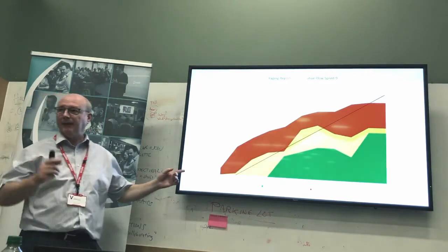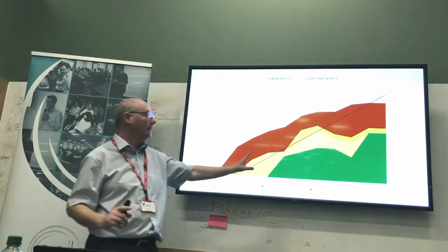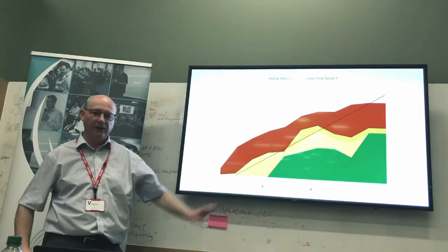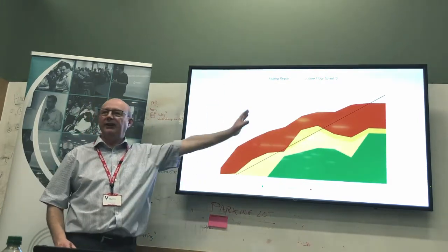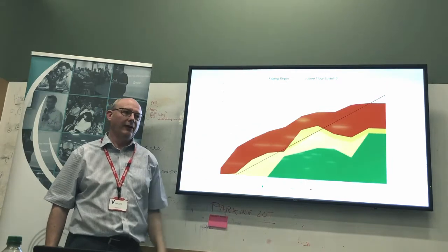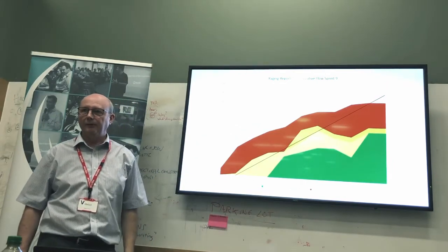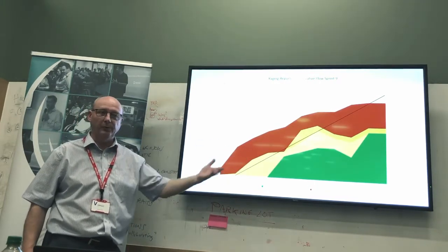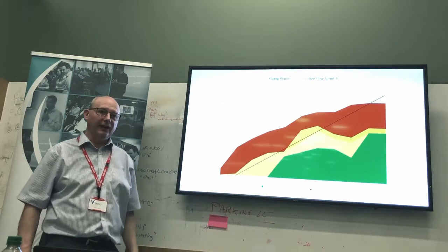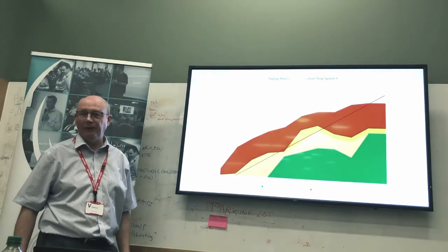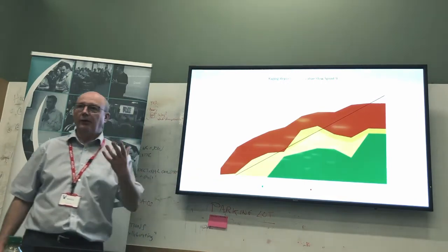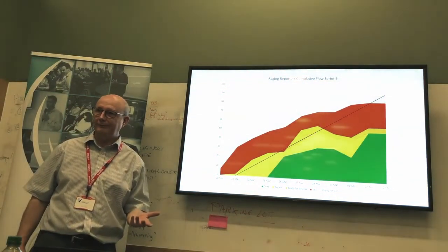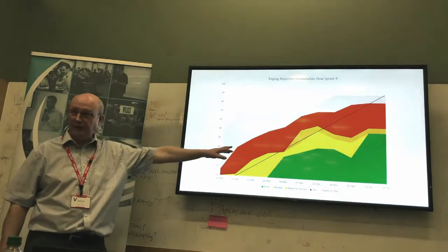So I think there's two different kinds. Exactly. What's happening here is pretty much that. The team are saying, "Oh, okay, I've delivered it to pre-prod, it's done." But what's not happened is anybody from the other side of the fence spending any time on testing or looking at what's been put onto pre-prod, onto the beta system, to say, yes, we've said it's done. There's no engagement from the stakeholders. Lack of engagement from the stakeholders. Yeah, late to the game.